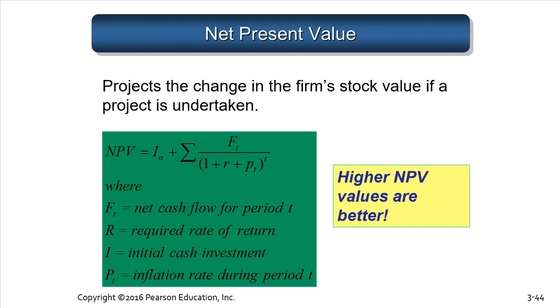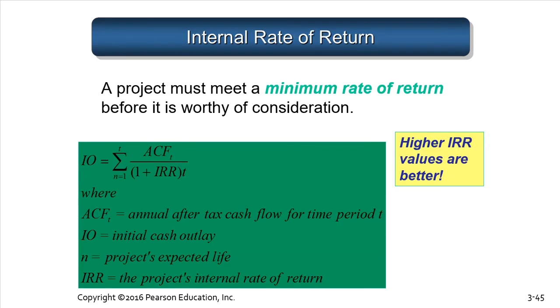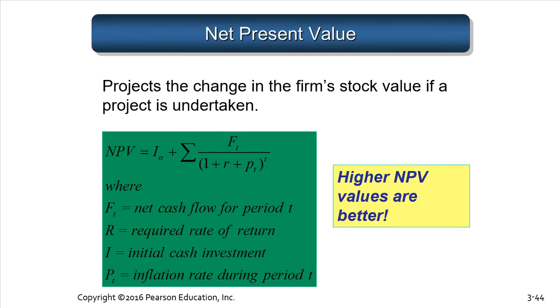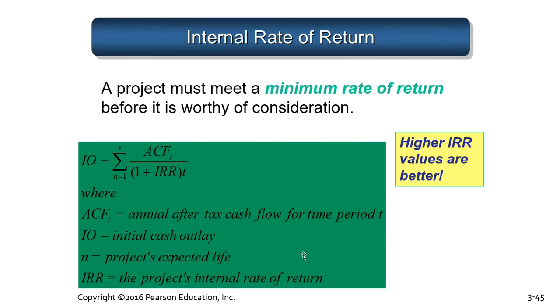Now, there is another calculation you can do that's really based on the NPV, and this is the IRR, or the internal rate of return. Let me just tell you a simple way to do this, and we'll explore this when I'm there. And in fact, I'll send the tutor a spreadsheet to show you how to do this. But it turns out that if you find what interest rate produces an NPV of 0, that gives you the internal rate of return.